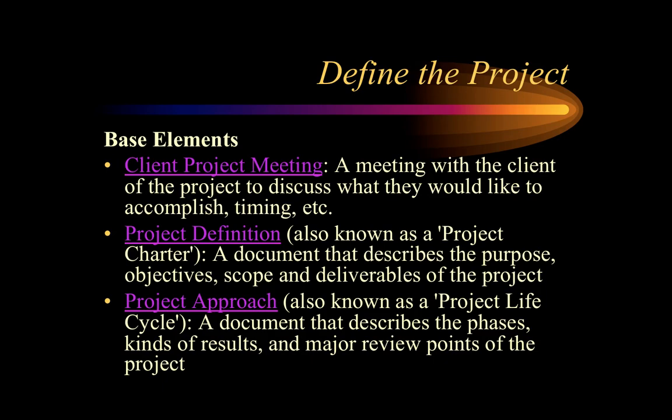A meeting with your client so that you understand exactly what their wishes are, what kind of timing, what are the specs that they require around quality, costs, what budget do they have. So that you have that initial meeting to try to establish something. And then you get into a bit more detail where you actually come up with a project definition or project charter, a document that describes the purpose, objectives, scope, and deliverables of that project. It's actually quite useful to work with a project charter because it's a document that can be shared so everybody's on the same page.